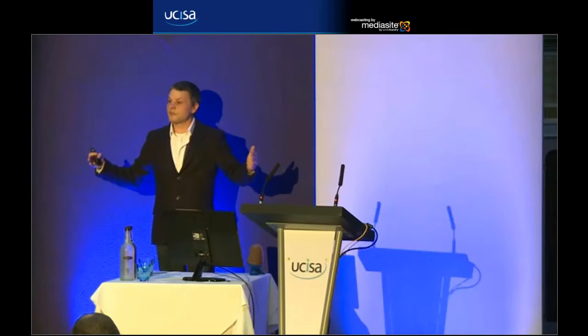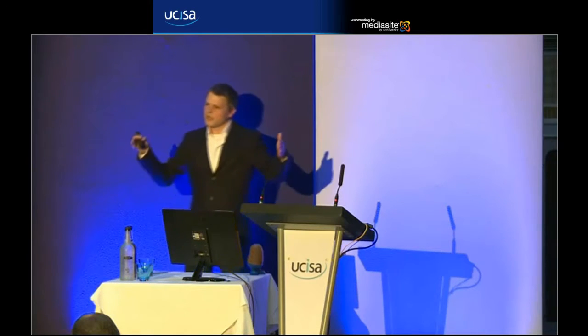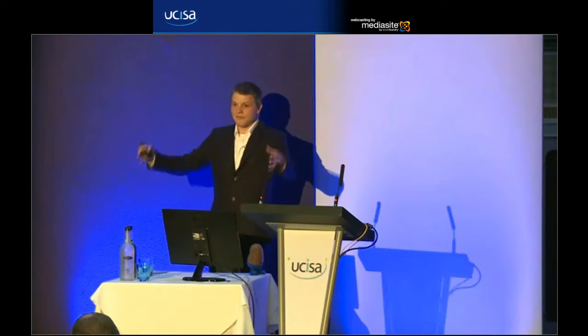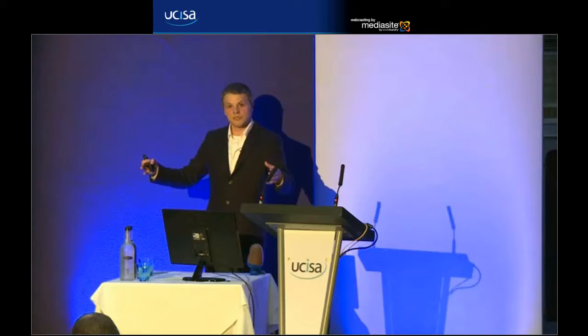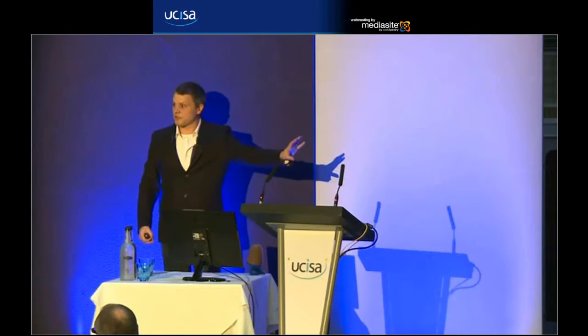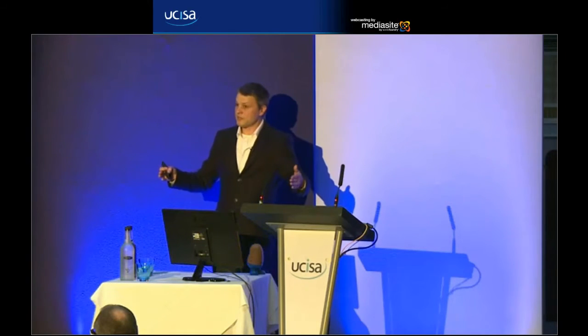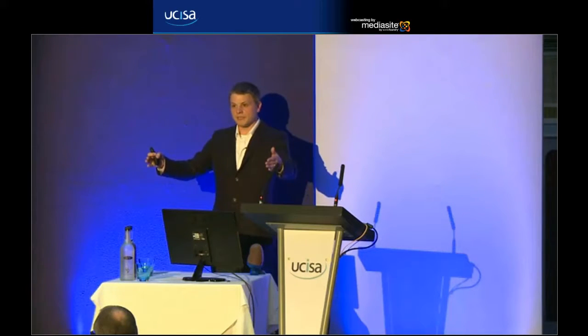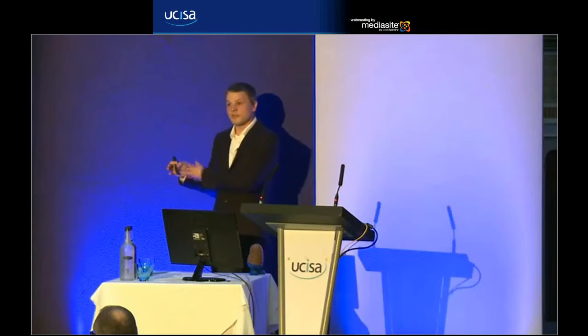As that goes along, at a point in time, we may reach a critical mass that says, we've actually got enough now to deliver this to the organization and then to get real business benefit from it. We've not finished the whole project. There's still all these other stories that we've got to do, but we've got enough critical mass here to say, yeah, let's go live with this and carry on with the development and release additional features as they come on.